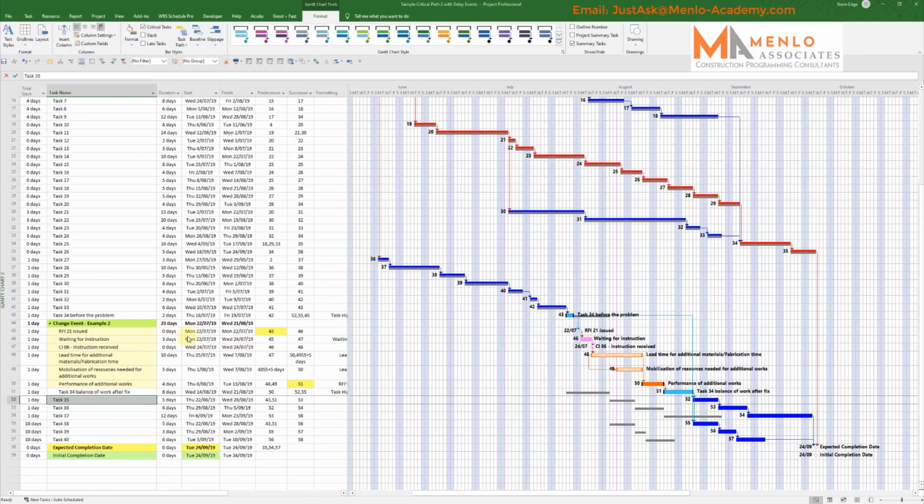Now what I'm just noticing here is that this is saying 23 days, and we were just talking about 17 days. The reason for that is that when I copied and pasted the task in, it automatically indented under this section, and to get the true effect of this section of work, I need to outdent it just to take it out of that summary, so it's not actually a subtask of this work. And that, as you can see there, then the net effect is 17 days, which is exactly as I said.